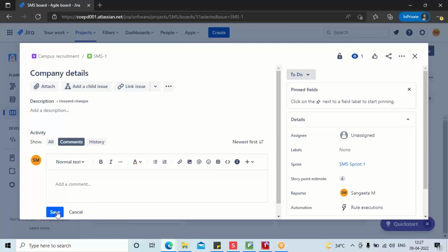Do these things have any formula, like in the story points or in business value? You have planning poker cards for your complexity points, and currency for business value. We have multiple techniques, guys. So is the BA going to calculate this, or some other people as well? The complexity points are calculated by the developers team, only by developers. And your BV value? And what about the Scrum team?